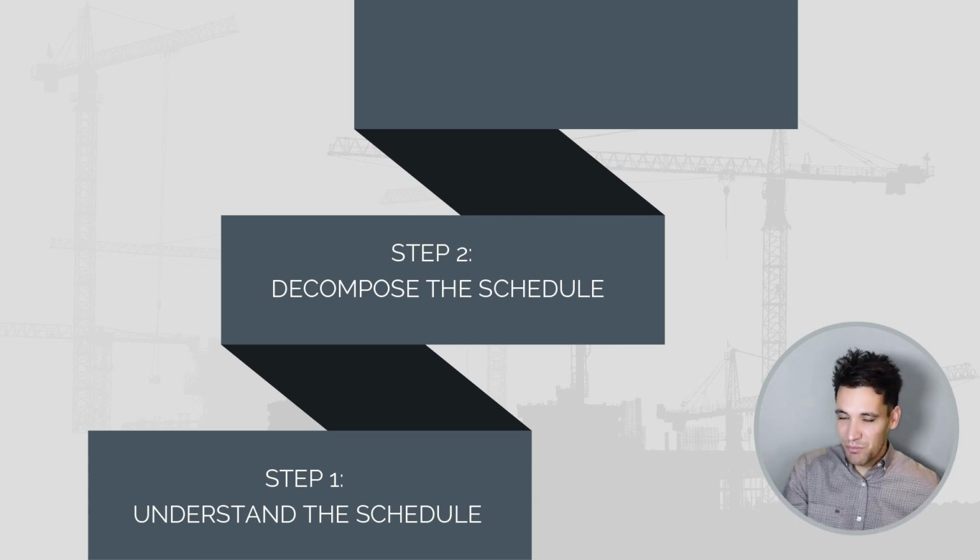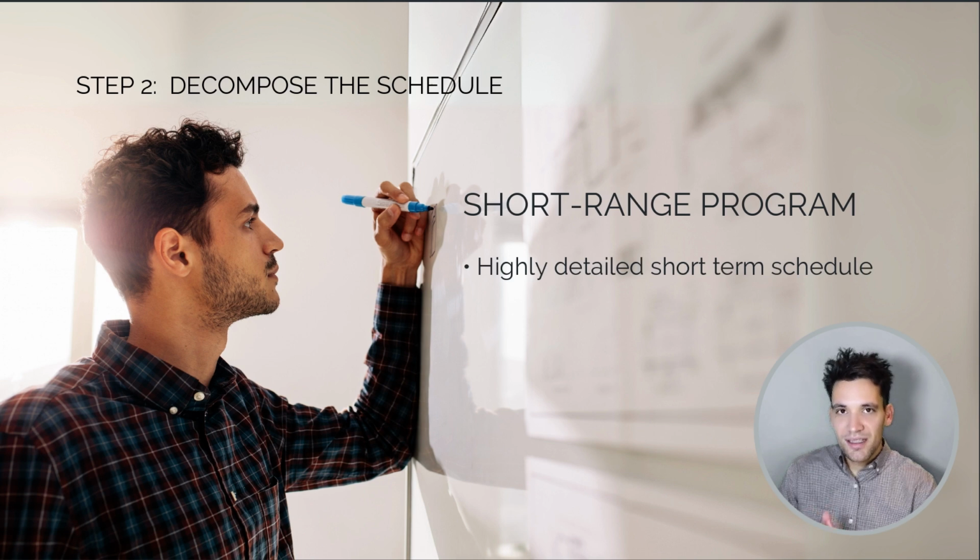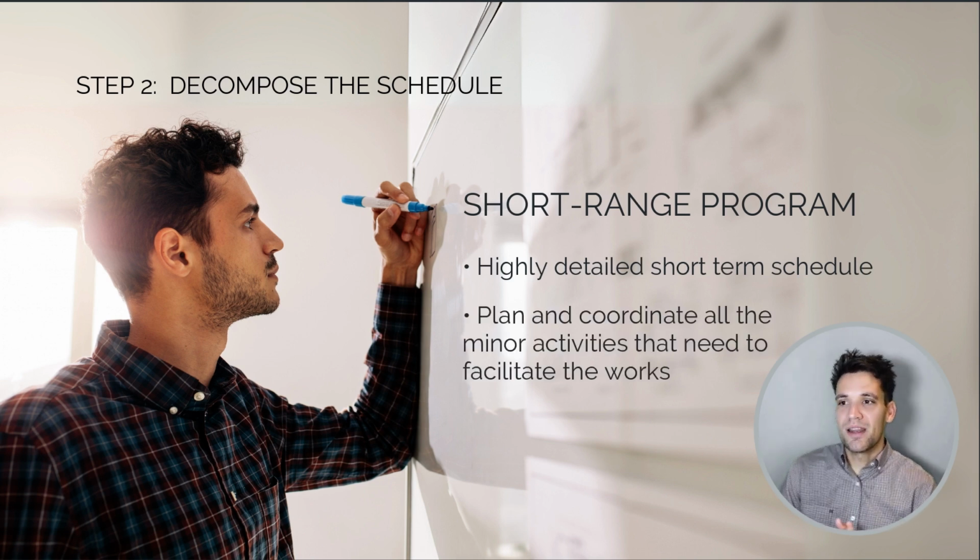When we're talking about implementing a schedule, we need to break it down into specific activities and tasks. These tasks will be more detailed than what was in the master schedule, and we're breaking it down into more detailed schedule levels. We capture this in a short range program. So a short range program is a highly detailed short-term schedule that we use to plan and coordinate all the minor activities that are needed to facilitate the works.